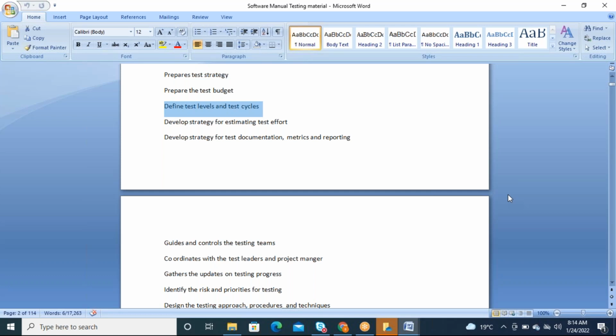So for all those tasks, they will segregate everything. Just give 10 hours or 15 hours based on the requirement complexity. For example, requirement analysis 2 hours, and all other test activities 2 hours each. So like that they will give 10 hours. They will take this effort estimation from us only.